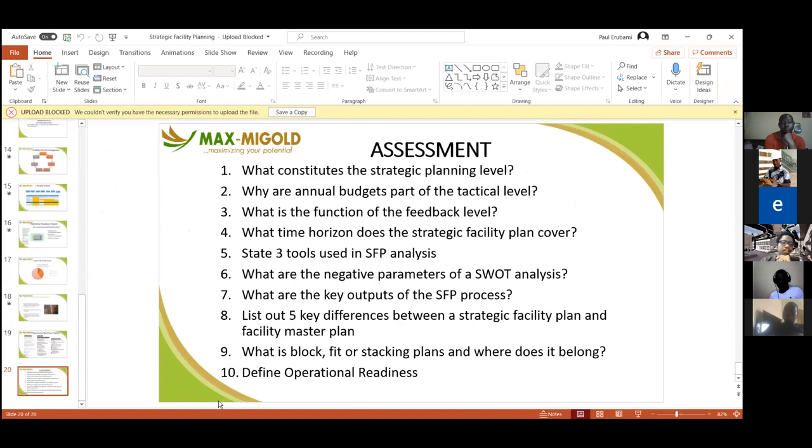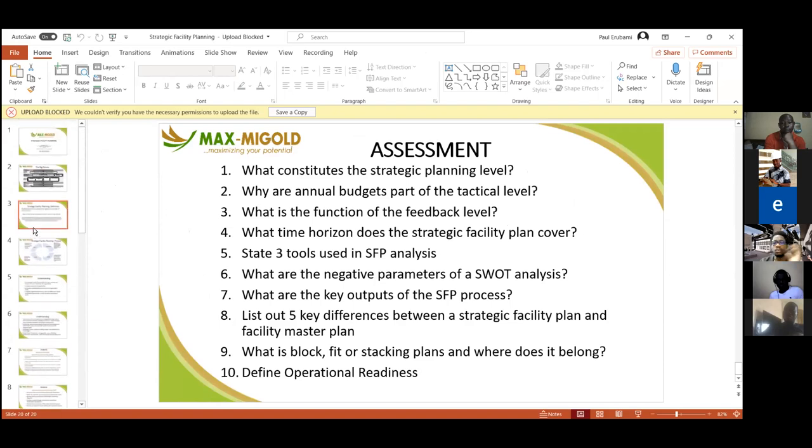Now, if you don't have them, if the people that delivered the project don't give you this information, and you really are struggling to have this data, then the asset register we ask you to develop now is a way to reverse engineer the process of gathering that data. For your as-built drawings, you can actually get people in to measure your building and draw them out for you. The service will provide any data to any organization. There are so many things you can do to get the data that you need that you don't already have. It will cost a little money, but it's going to make your operations smooth sailing going forward. Okay? So that's our lesson for today.